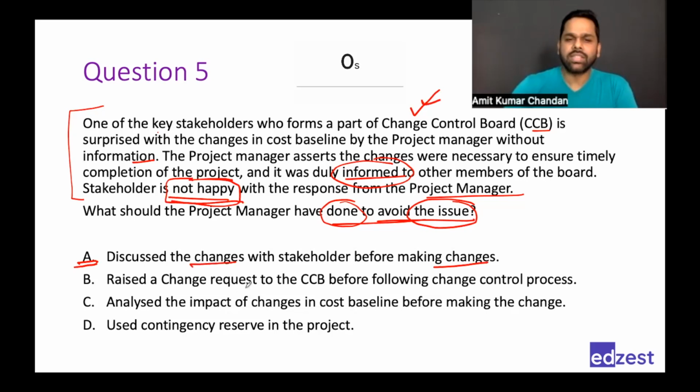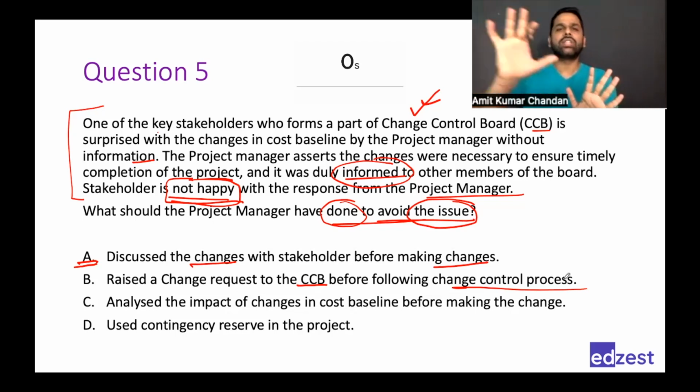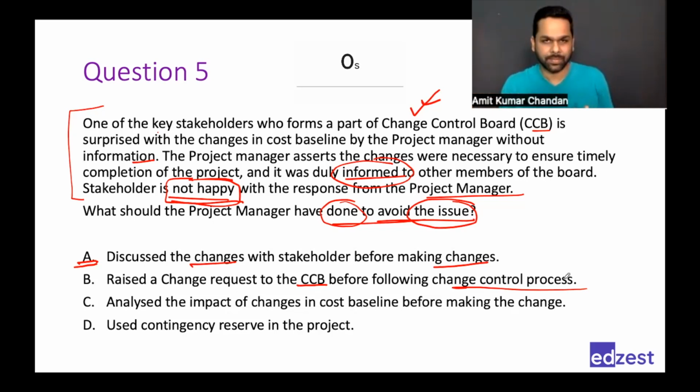B, raise a change request to the change control board before following the change control process. What does this mean? It means that you should have raised a change request and then followed the change control process, whatever the process says.